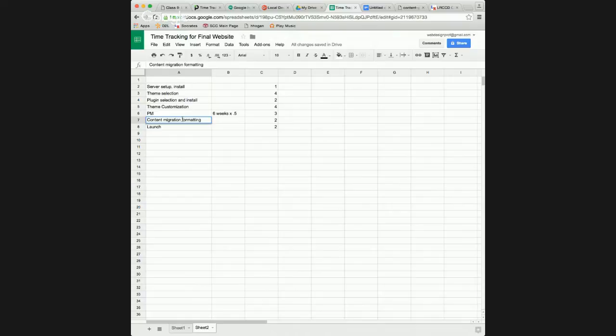When we're doing massive sites, we banked on 3 pages an hour. Think about that, 3 pages an hour, that's pretty slow. Because you have to go through it and make it look good and add the images, and you might have to resize images. And you might have to check spelling for them because their spelling's not right. You're going to have to add pull quotes and format all the text and read it.